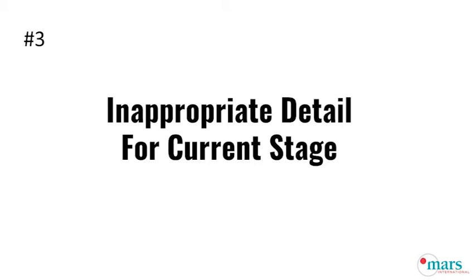So at the later phases, you should have all that detail. If you're getting into some of your final engineering design reviews and you still have TBDs in your spec, you've got a problem. Beginning phase, not a problem. End phase, problem. So that's what I mean by inappropriate detail for current stage. So the key suggestions there are to, again, not get paralyzed early on. A partial spec now is better than just dragging your feet and either having no spec at all because you're worried it's not going to be complete, or not even starting on a project because you want to make sure that every last little I is dotted.